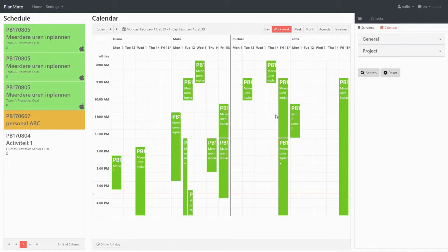You can say, for instance, it's a bit like handling the chaos. It happens all the time around me here. I was assigned a task to do in 4 hours, and after 2 hours a telephone call comes or something completely else, and I have to deal with it. I cannot drop it. But of course, my project manager must know that I haven't spent that. In this way I give him the ability to be notified first of all and to do something with it, so that those tasks don't get lost, which was a problem.